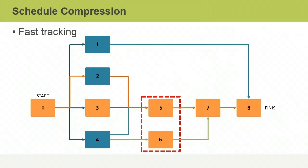Fast tracking involves scheduling two or more activities to be performed in parallel instead of one at a time, helping speed up a project. For example, having technicians test each module of a program as it's finished instead of waiting for the whole program to be completed could save time. A downside is that fast tracking may increase project risk and can only be used if activities can be safely overlapped — testing modules during ongoing development may mean errors could be missed.